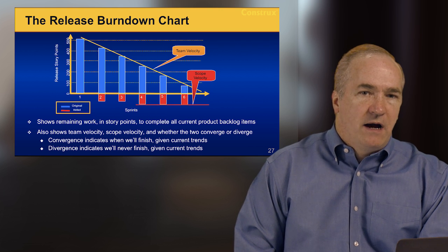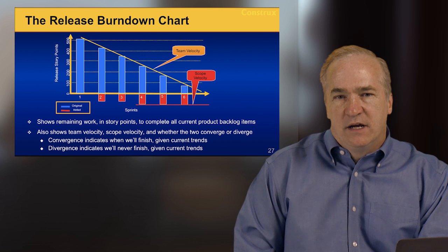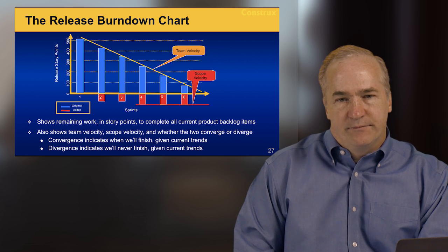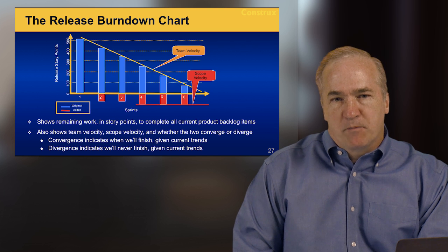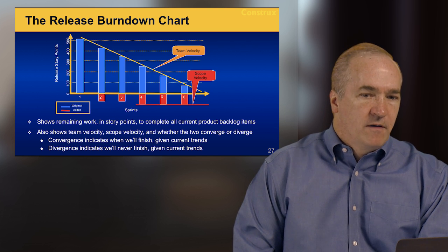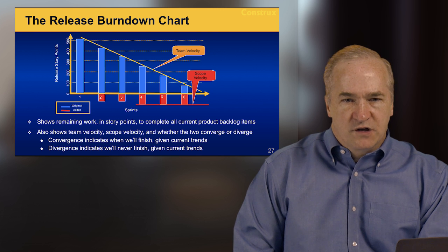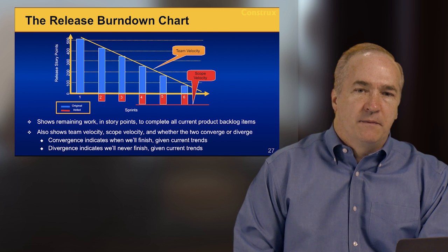The beautiful thing about a release burndown chart drawn in this fashion is you can immediately see the impact of adding scope to your project, what it's done to your timeline. We can also use a release burndown chart, again, for being able to forecast delivery dates and scope. If we cut scope, where will we cut scope? Off the bottom of the bar.